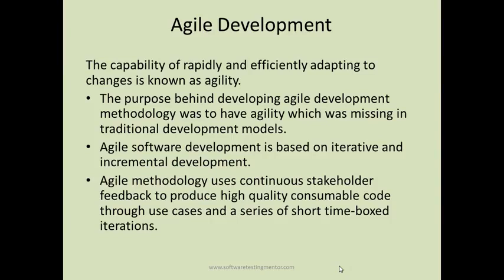Within the sprint, all the activity, design, development and testing, takes place. After testing, any defect raised is fixed by the developers and retested. Once everything is tested and there are no critical defects, it is showcased to the stakeholder at the end of 2 weeks or the end of the sprint.